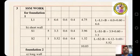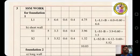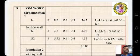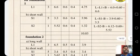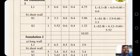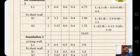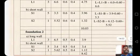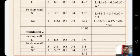Third item: SSM work for foundation. Long wall L1 — 3 numbers, length = 6 + 0.6 = 6.6 meter. 6.6 × 0.6 × 0.4 = 4.75. Short wall S1 — 5 numbers, 3.9 minus 0.6 = 3.3 meter length; 5 × 3.3 × 0.6 × 0.4 = 3.96. S2 — 1 number, S2 = 6.12 minus 0.6 = 5.52; 5.52 × 0.6 × 0.4 = 1.32. Total quantity of first step SSM = 10.03 cubic meters.